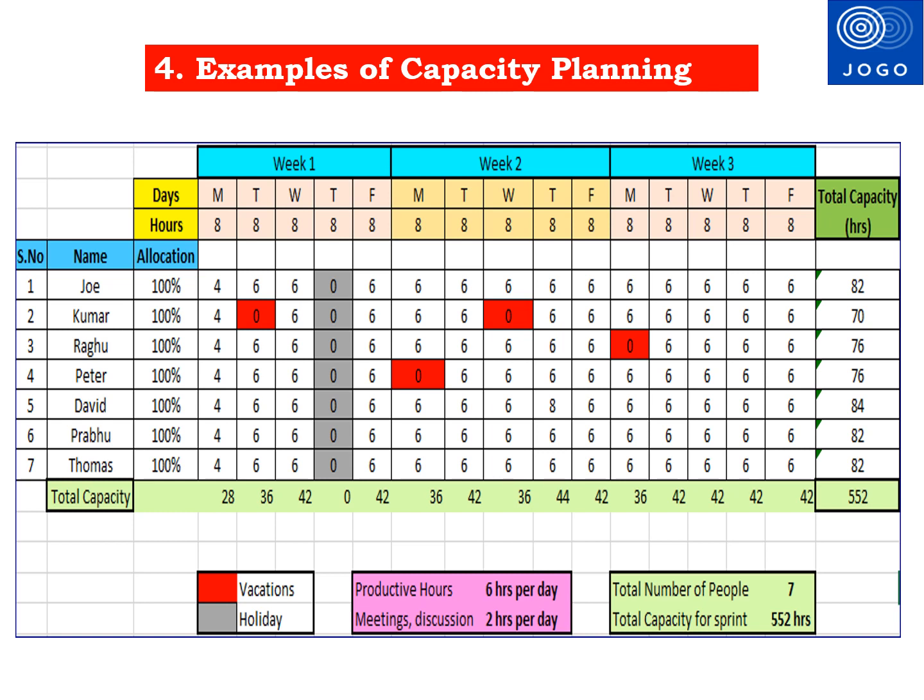The capacity of each team member is shown in the last column on the right side. For Joe, it's 82 hours; for Kumar, it's 70 hours, etc. This represents each individual team member's capacity for the 3-week sprint. The total team capacity is calculated by adding all team members' capacities. As per this example, the total capacity for the team is 552 hours.